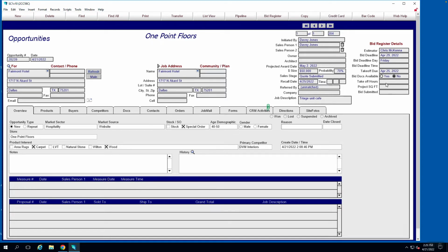And you can also plug in the amount of square feet in the project, and that way it would start giving you a measurable metric, in a general sense, of how many hours per square foot it would take to do. So if you see another plan and it's for 250,000 square feet or something in a building, you can say, okay, that's going to be about this many hours, so that you can give your estimators plenty of lead time with when the takeoff is due back. So that is the goal anyway.